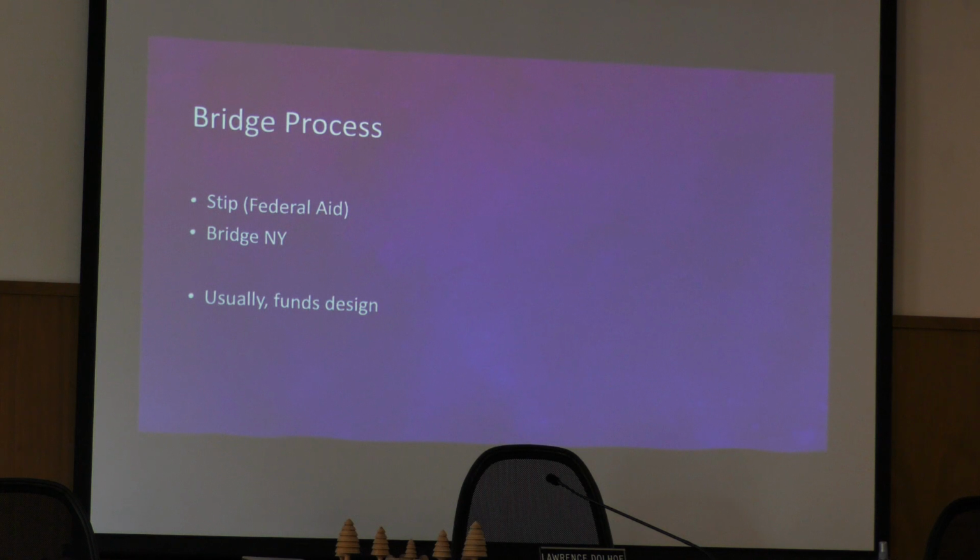What happens is they usually fund the design of a new bridge, and then once the design is ready to go out to bid, we shop for funding either through the STIP or through Bridge New York to fund the construction of the bridge. Most of those right now are over $1 million. You're not going to see any bridge right now replaced for under $1 million. In fact, box culverts now are well approaching more than $1 million.